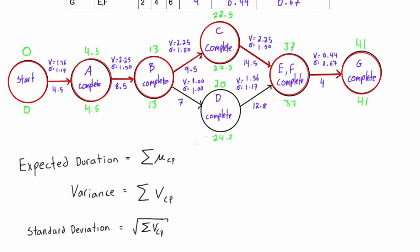So let's fill in that information. The sum of the expected durations for each activity along the critical path: when you add those up you have 4.5, 8.5, 9.5, 14.5, and 4. The sum comes out to 41, and you can see that's what we learned visually from just inspecting the network diagram.